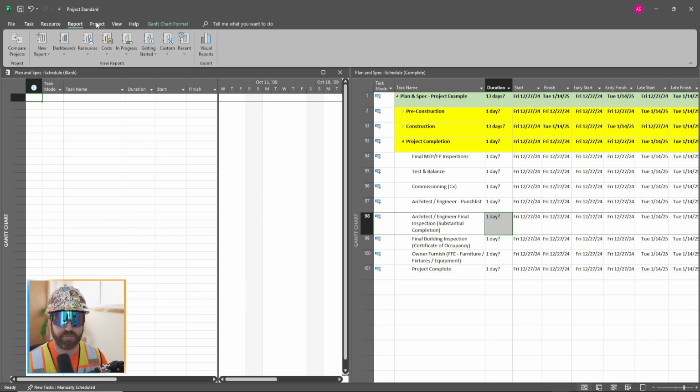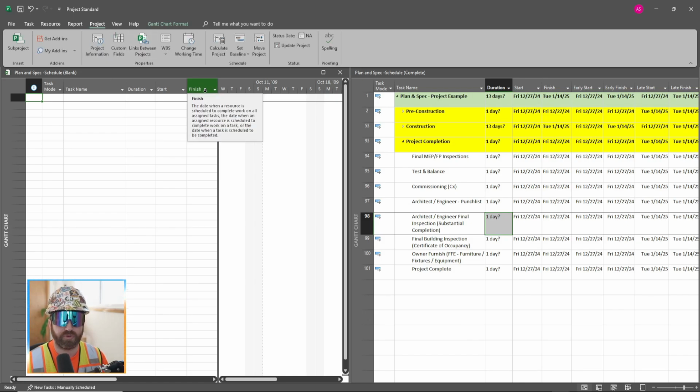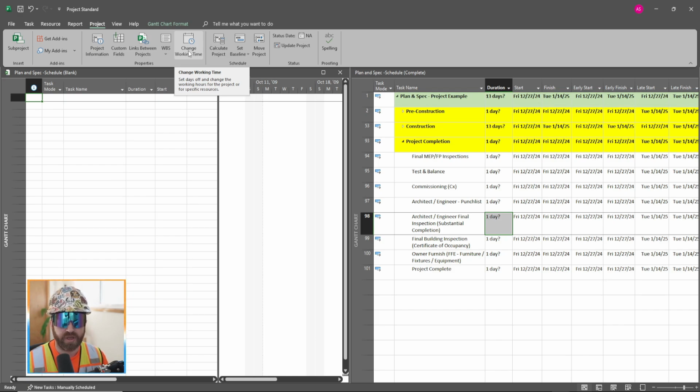Moving on, we have the project tab. So this is where I would set up that general project information, such as the start date. Also, I mentioned earlier about corporate holidays. You can create specific calendars that you want to apply to different projects. Again, we're not going to get into all of that in this video, as that's not necessary right now.